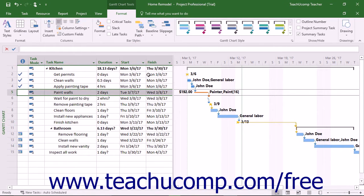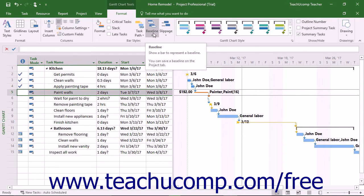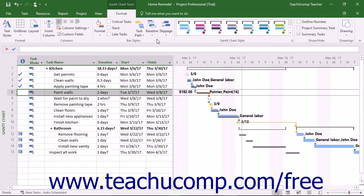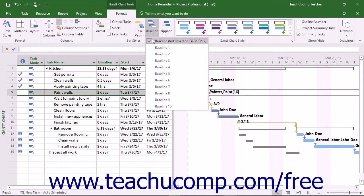If you have saved a project baseline, you can compare how the project is performing by comparing the tasks to the saved baseline. To show baseline task bars next to the project's task bars, click the Baseline drop-down button in the Bar Styles button group and then select the desired baseline to use from the drop-down menu. The baseline task durations then appear next to the project's task bars. To toggle the display of the selected baseline's task bars back off again, simply repeat this process.